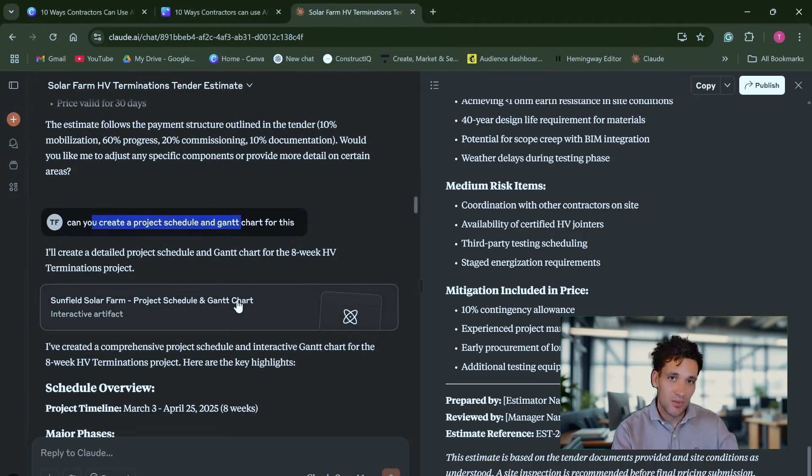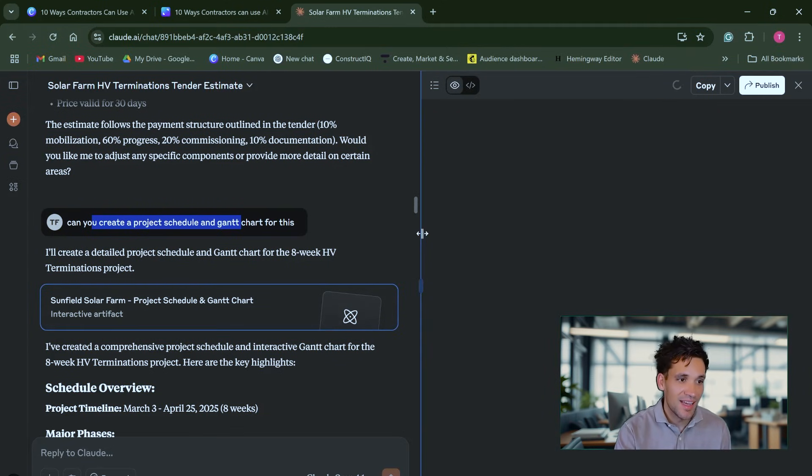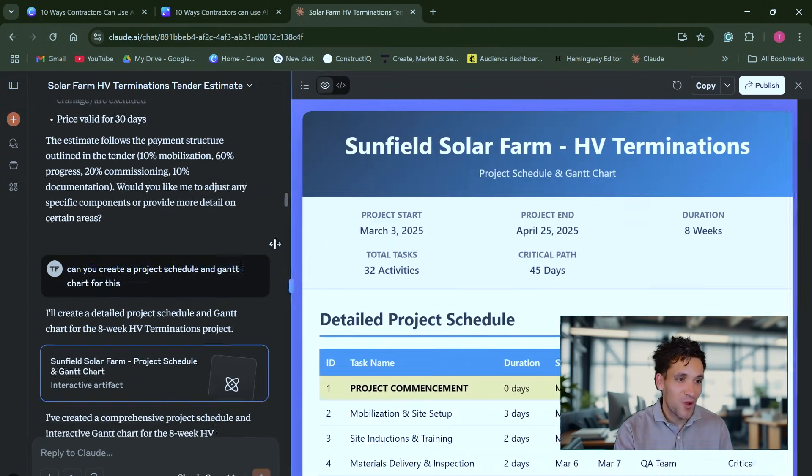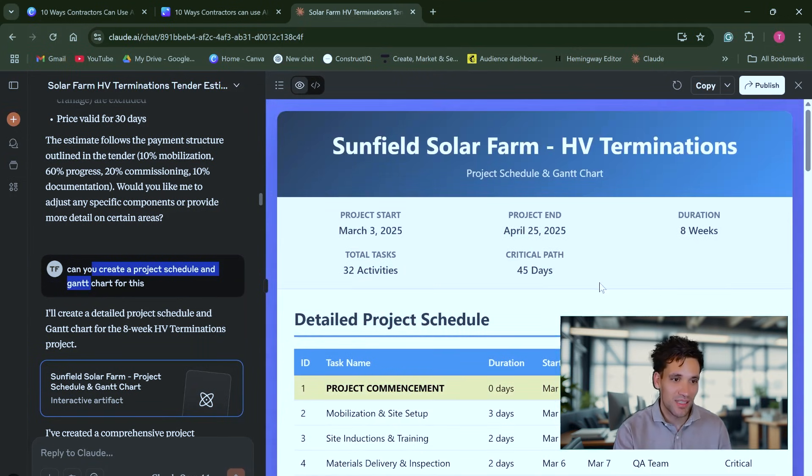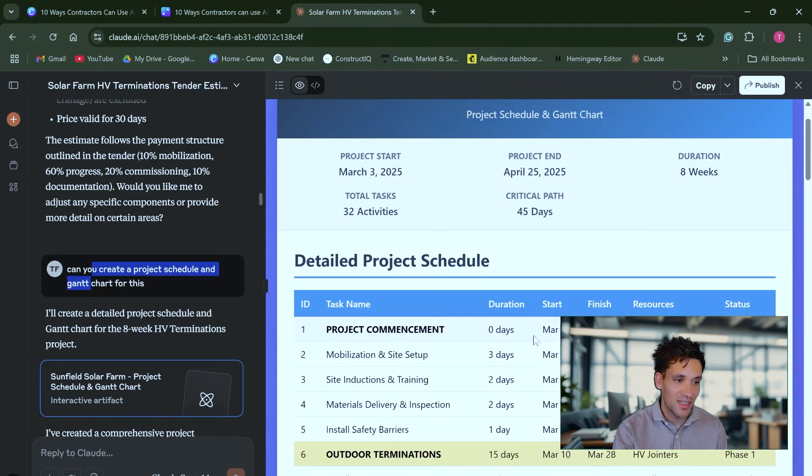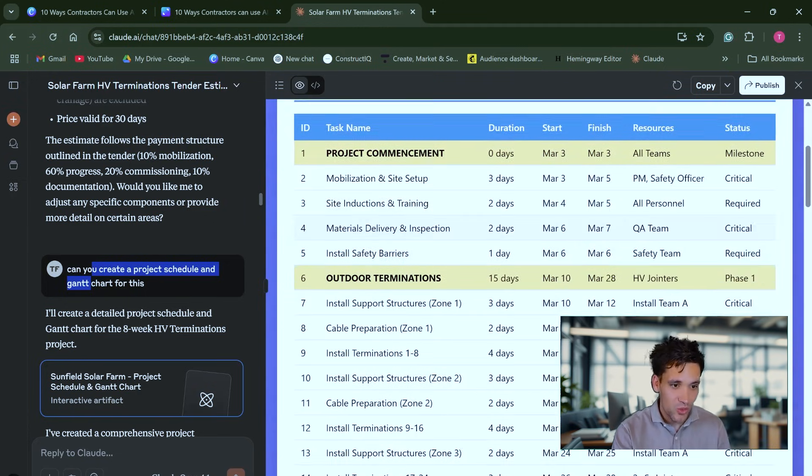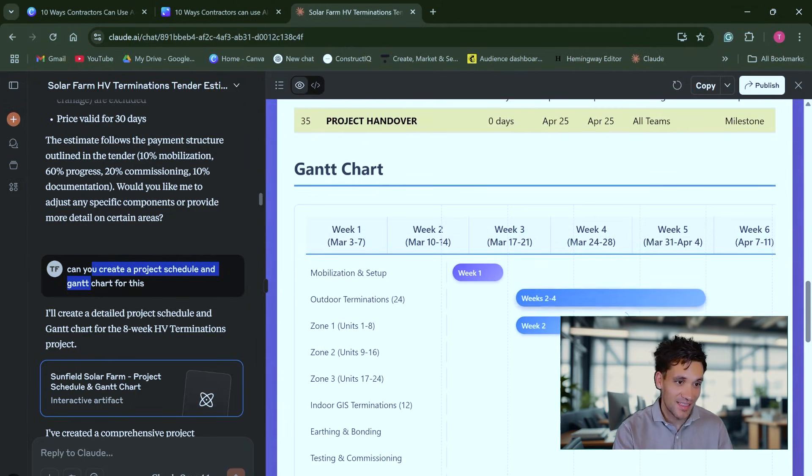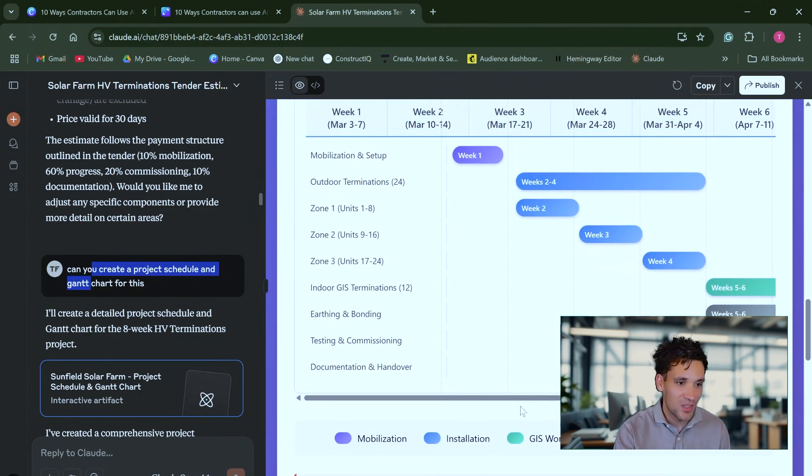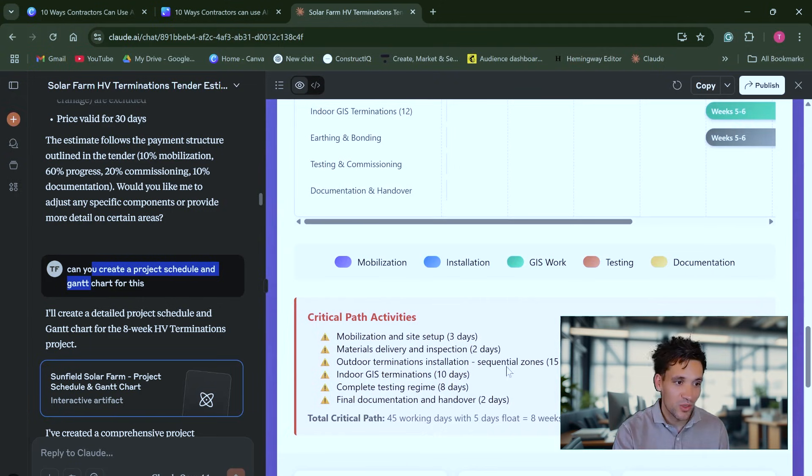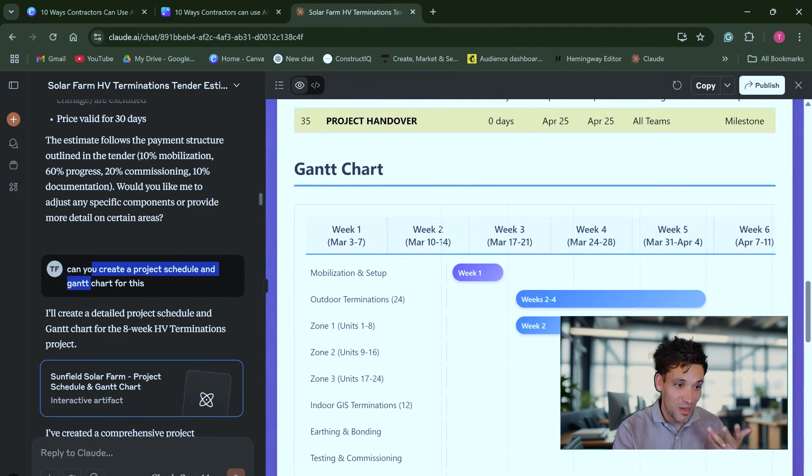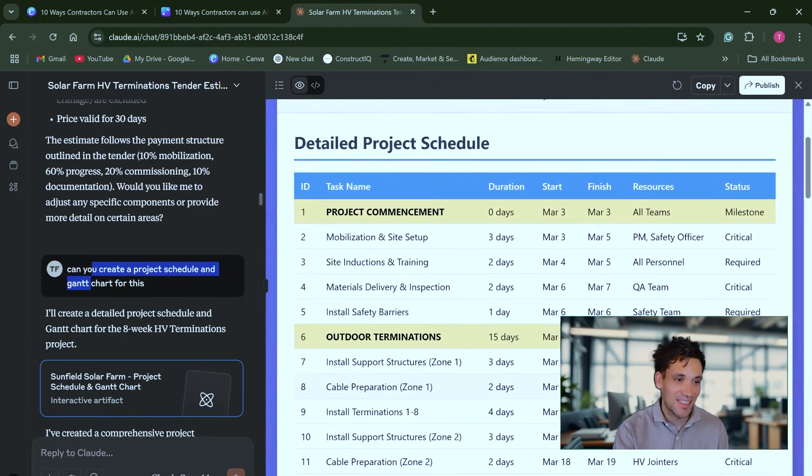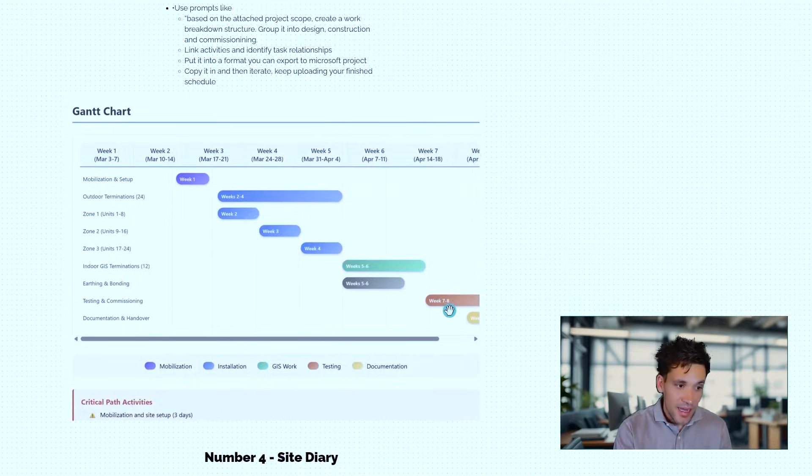Claude went and created a fully clickable and interactive Gantt chart, a detailed project schedule based on our eight week duration, start and finish date, the breakdown of all the different activities, the resources required for them, and this Gantt chart showing what's happening in each week and also what the critical path is. Again, we could prompt it, we could iterate through this and improve the output. But based on that single prompt, in a matter of seconds, it produced this, which I think is absolutely amazing.